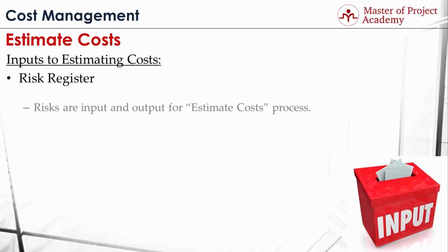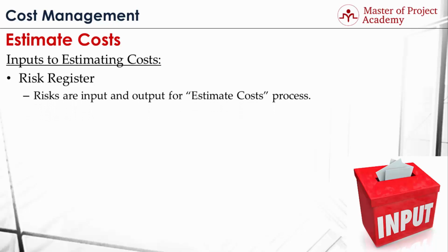Therefore, risks are input and output for estimate costs process. Apart from the impact of risks, there will be risk control costs. For instance, you will need periodic risk reviews, reevaluation, and monitoring risks throughout the project, and all these will bring cost to the project.